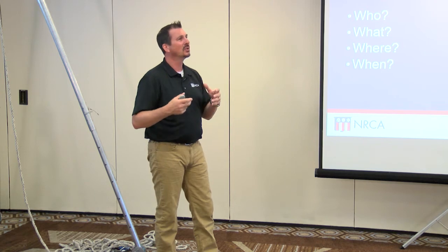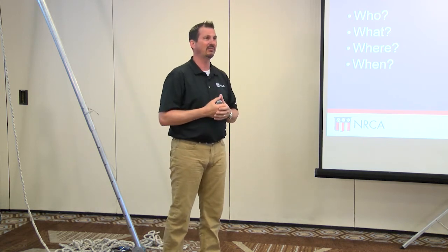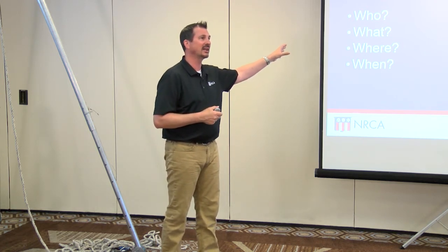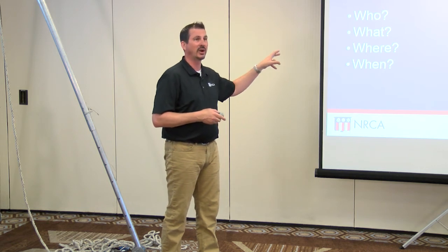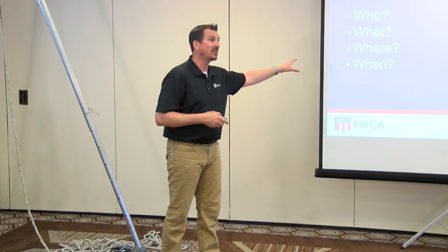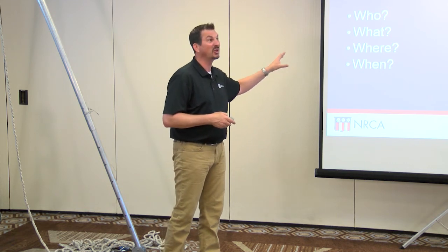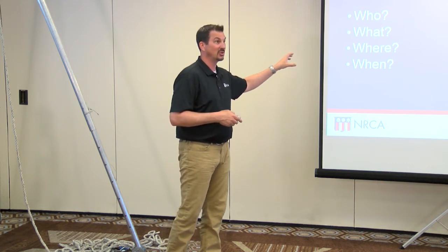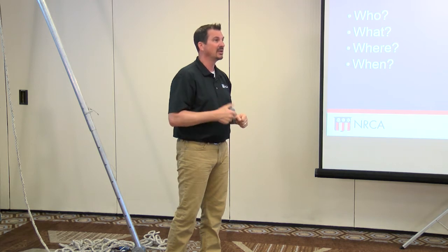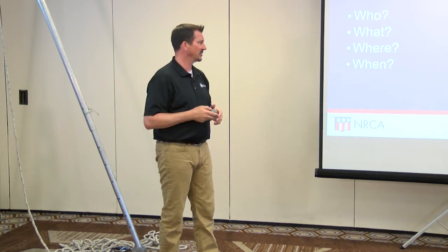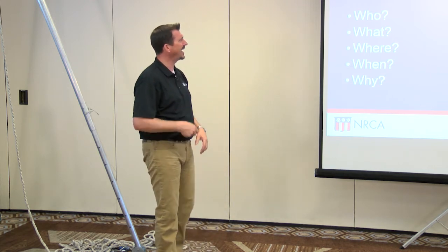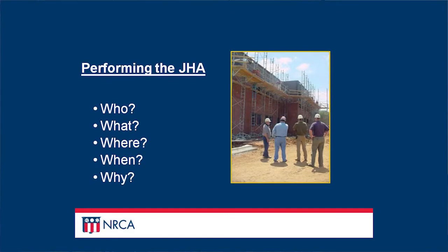And in this case, we try to get all of our information in ahead of time and try to get all that hazard analysis done prior to the job. As I stated before, that doesn't mean that we can actually give up on this JHA, that can't be tweaked during the job. So the when starts prior to the job, but it can go on throughout the course of the job as well. And lastly, why do we perform it?